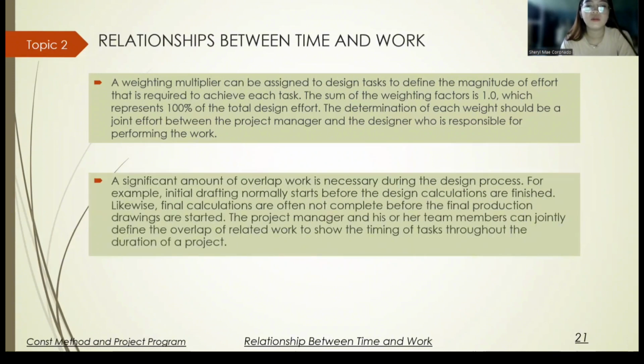A significant amount of overlap work is necessary during the design process. For example, initial drafting normally starts before the design calculations are finished. Likewise, final calculations are often not complete before the final production drawings are started. The project manager and his or her team members conjointly define the overlap of related work to show the timing of tasks throughout the duration of the project.